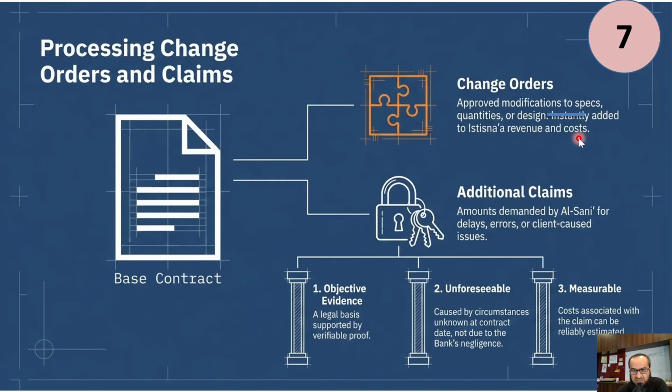These are the modifications. For the modifications, we have to mutually agree upon the contract specifications and the change in the contract price, and accommodate that into our calculations for percentage of completion, and accordingly everything recorded after modification will take into account those changes.